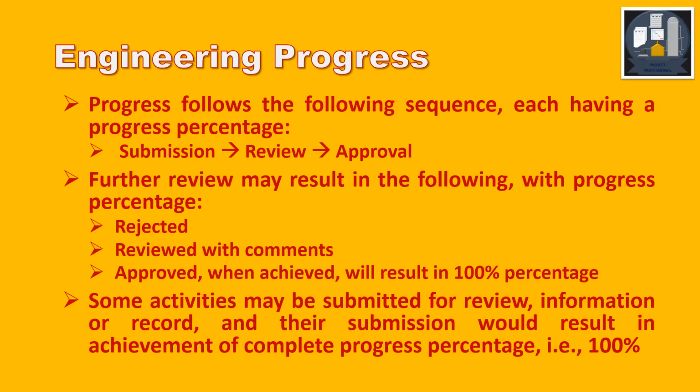Some activities may be submitted, some deliverables may be submitted for review, information, or record, and their submission would result in achievement of complete progress percentage, that is 100%.